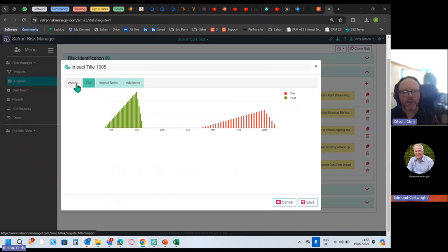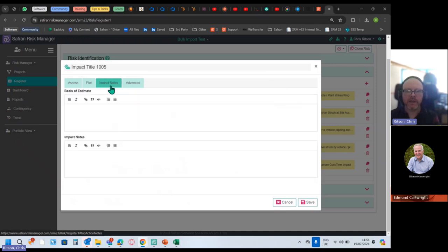I'm not 100% sure that actually feeds through to the main Monte Carlo, but what it definitely does do is help you move an equivalence value on the PID matrix. So when you change your perspective and it's a qualitative impact only on health and safety, it helps you move the dot that was on the matrix into one cell or another. Right. That's how it's being used.